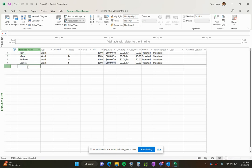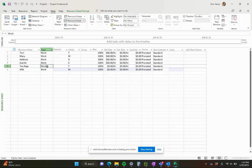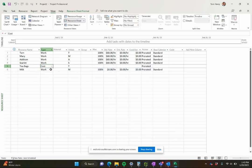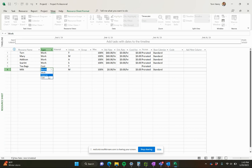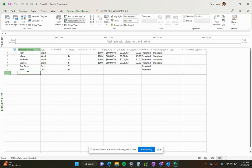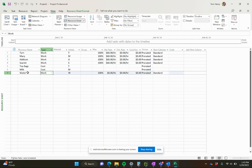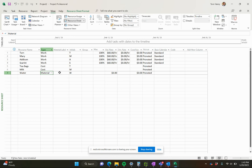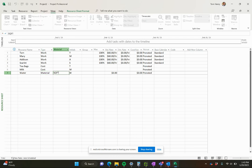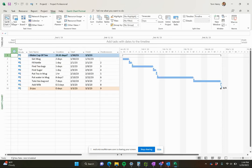You can also add cost resources. We're making a cup of tea. We're going to set tea bags. We want to track how much we're spending on tea bags and milk. Instead of them being work resources, which is pro-rated resources, we're going to make cost resources, which is more like a fixed cost resource. So you see the hourly rate for those goes away. I can have materials as well. Let's say the materials in this case would be water coming out of the kettle, coming out the tap. I'm going to make that a material resource. We've got to specify the material label - I'm going to say per square foot of water, just so you can get the idea.